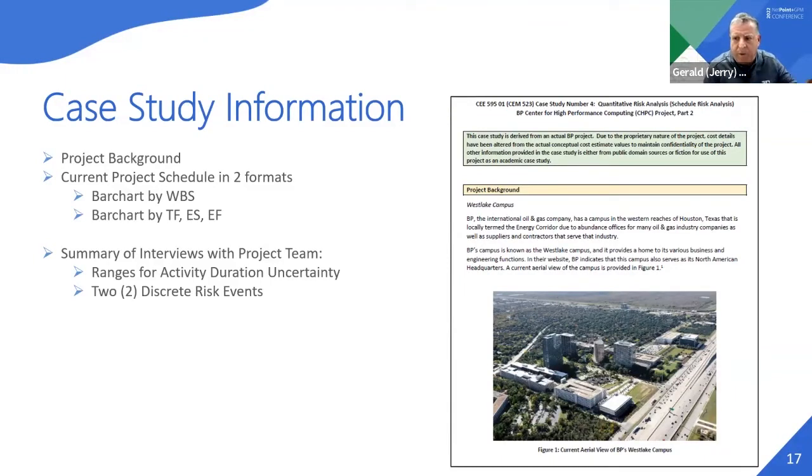When we do risk analysis, quite often, especially when we have a large schedule, this is one of the sorts we commonly use to try to identify what's the critical path, what are the near critical paths, et cetera, to help us create the schedule model. So that was the technique I was trying to share with the students and have them go through.